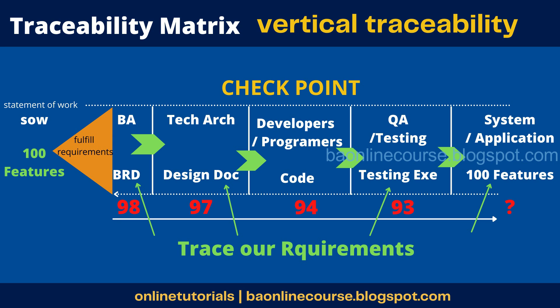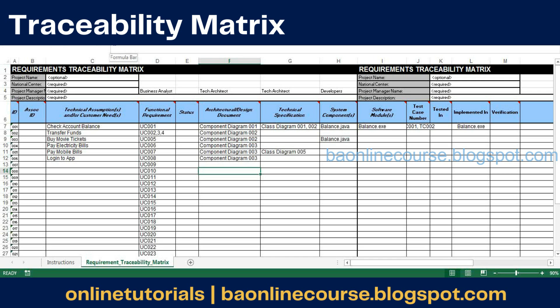The traceability matrix is nothing but an Excel sheet or a Word document with all these details — it has the various teams, all the functionalities, and the hundred features listed in it. You will mark it yes or no: if it's done, you mark it yes. You have to make sure that all of them are translated to the next phase. It's a joint exercise — you will contribute during the requirements phase, the architect fills in after design is completed, the tech lead fills in after programming is completed, and the QA team fills in after testing is completed. That way, you can be pretty much sure that when you deliver to the customer, they are getting hundred percent of requirements without missing any.